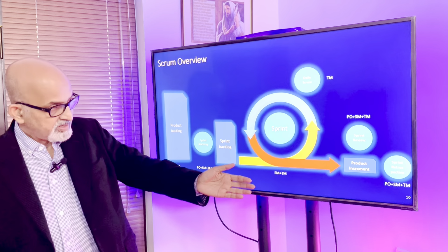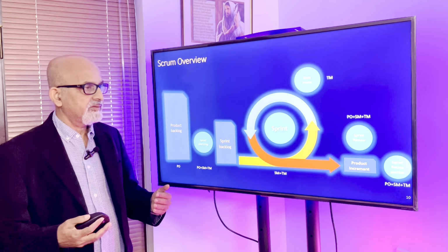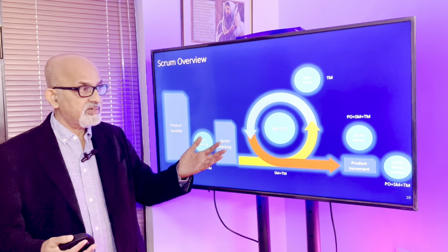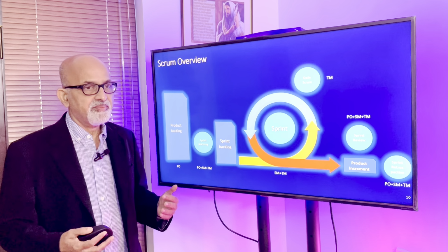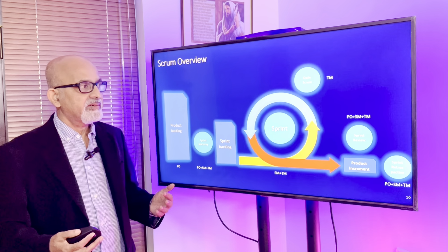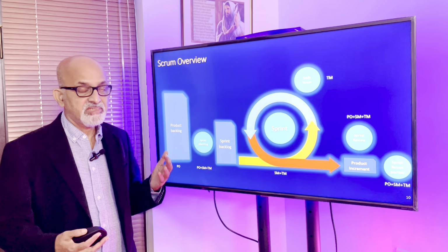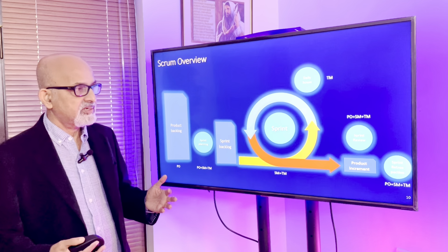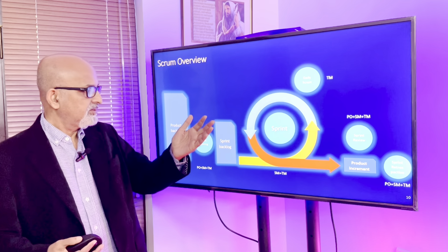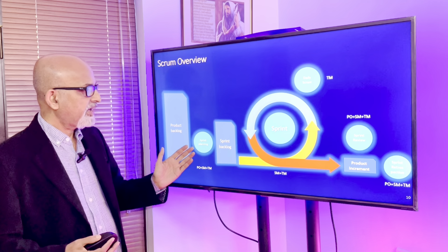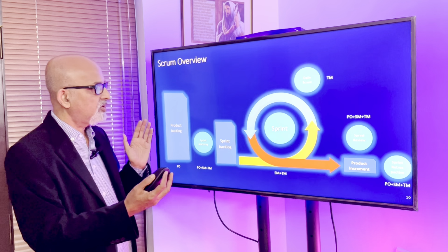Then after that, the team gets into a sprint retrospective meeting. The sprint review is around a 4-hour meeting, and the sprint retrospective is approximately a 3-hour meeting, where they discuss what are the things we did right and what are the things which need improvement. Those aspects are discussed, and with the added learning, they come back and plan the subsequent sprint. So this is the Scrum overview.